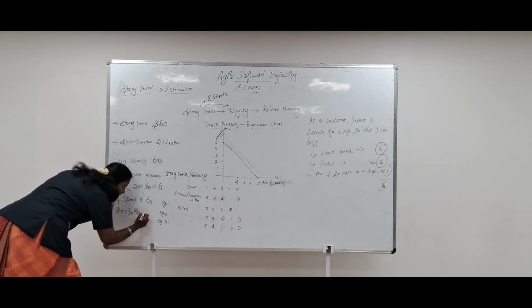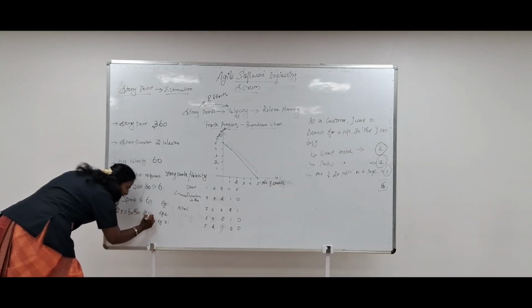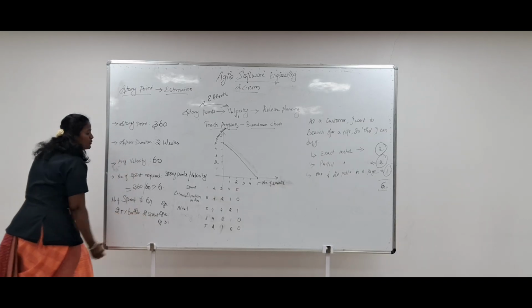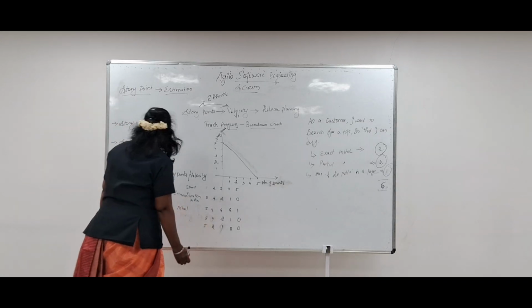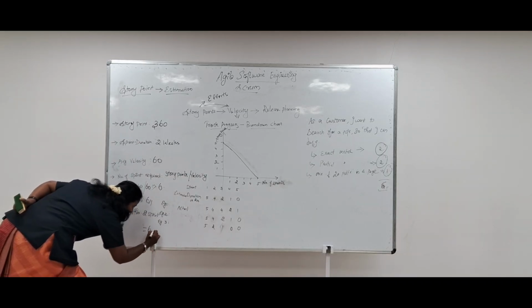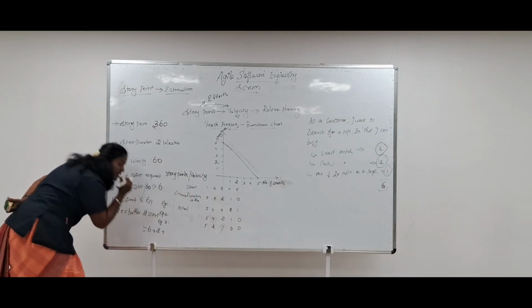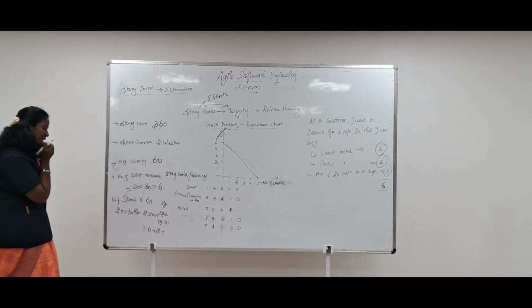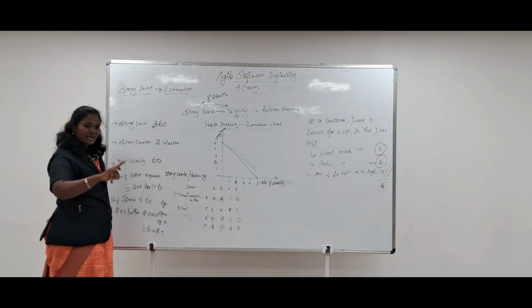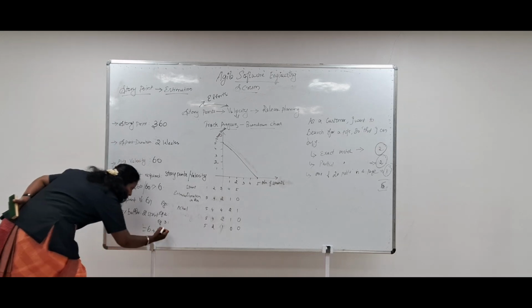So 25% for buffer means 2 sprints will be given. Totally, it will be 6 plus 2 plus 1 for pre-release. Before the release, we need a pre-release, and for that one sprint will be there.